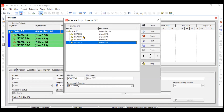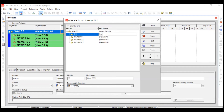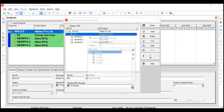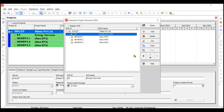Click Add four times for the four sub-EPS. The first one is Energy Services — set the ID to 'ES' for Energy Services. This EPS will be assigned to the responsible manager M. Sahu. Click M. Sahu, then click the Select button to confirm.